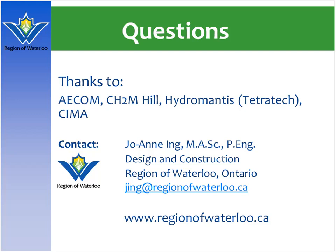Okay. Third question concerns value engineering, and the question is, how did you use value engineering as a concept in this project, and what lessons did you learn? Well, we applied the value engineering at the site-wide facility planning, as well as different stages in the detailed design at about 60%. They looked at optimization from an energy standpoint, as well as reviewing the type of mixing systems for the digester upgrades, and the number of clarifiers for the secondary treatment for the new plant 3 and 4. We tried to reduce some costs.